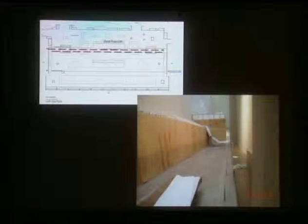Once the case demolition was finished and all the debris removed, the process of building the temporary structure within the gallery space began. Again, double layers of plastic went up in the area around the fascia wall, but this time to protect one side against the other. We stayed busy as well, because we had to lay out a shelving elevation that would accommodate all the large, heavy, and unusually shaped objects with little room to spare.